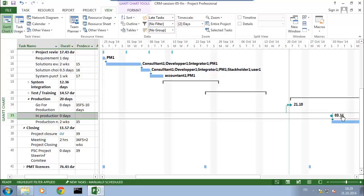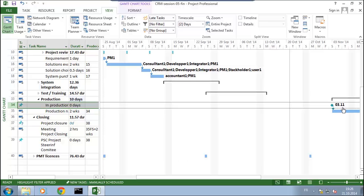The production date is the 3rd of November. Sometimes there is a task that needs to be done before — to decide whether we are going to go into production or not. In order to be in production on the 3rd of November, it may be good to set the date when we decide whether to go into production. I propose we set that date two weeks before, so I will add a task here.